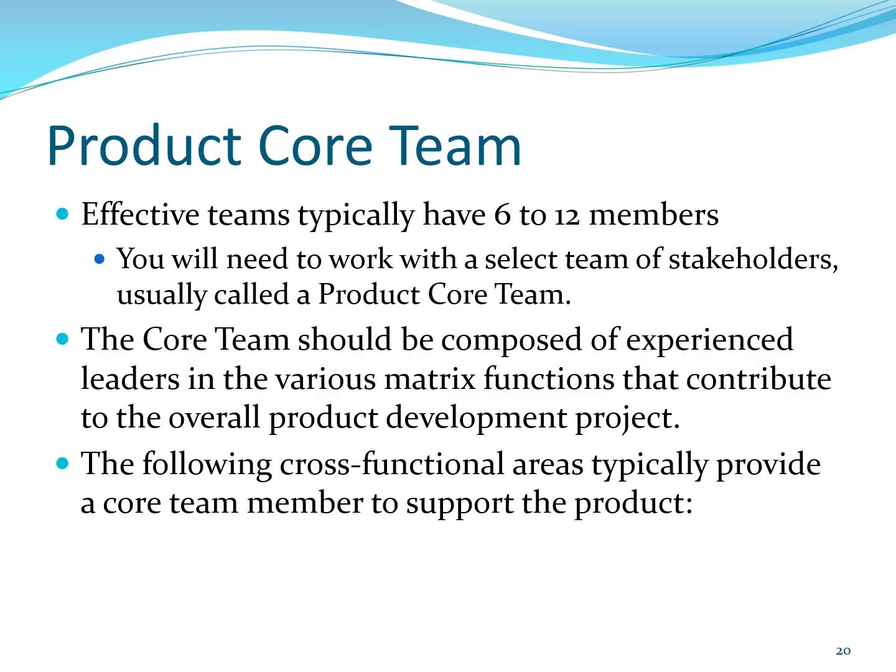Experience has shown that effective teams typically have 6 to 12 members. Agile Scrum recommends 5 to 9 members. Of course, most product development projects require far more than a dozen contributors. So, as the project manager, you will need to work with a select team of stakeholders, usually called a product